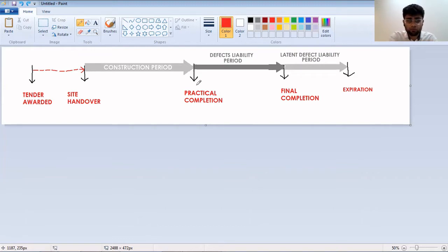And so this date has to be predetermined right at the very beginning, even before the site handover. It's when the contract commences. So when the contract commences, there must be a discussion of this date. And this is why the planning by the architectural professional is so important, because the architectural professional is going to say, here is this planning according to the Gantt chart. If it starts in January, it should end in December, and December should be the date for practical completion.